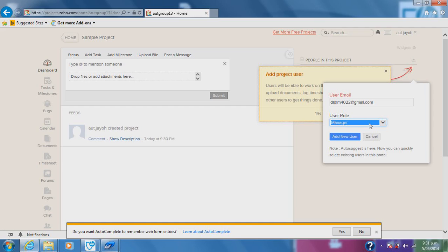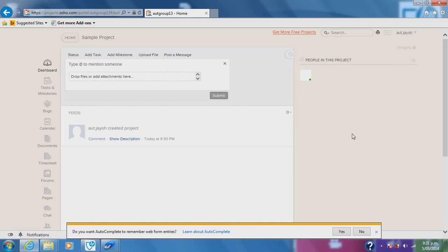Thus, for a small group with one project leader, it is wise to assign everyone as employee, which only allows them to view the project and communicate with other users but cannot modify any items. For this video, I will invite one of my project group members as employee. While we wait for the response, let's look at adding milestones.